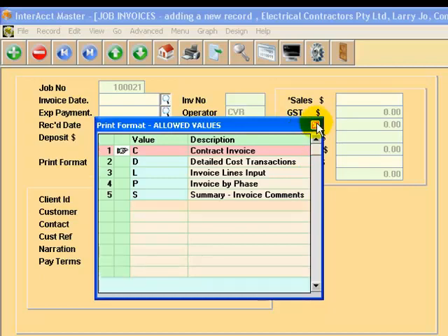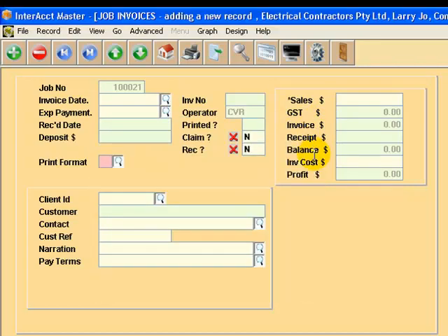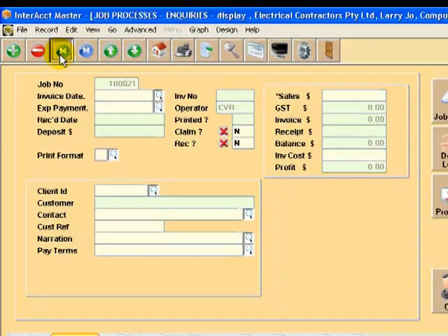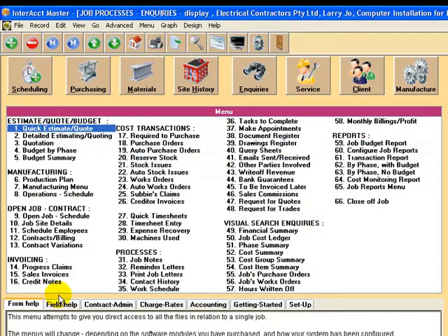you not only see the invoice, but you can see a reconciliation right from the original contract as let, plus any variations to contract, and it lists out those variations. It calculates the adjusted contract sum, and then it lists out what you've invoiced so far on that job. So it's a complete reconciliation for the customer, so they can see how this job fits into the overall contract.